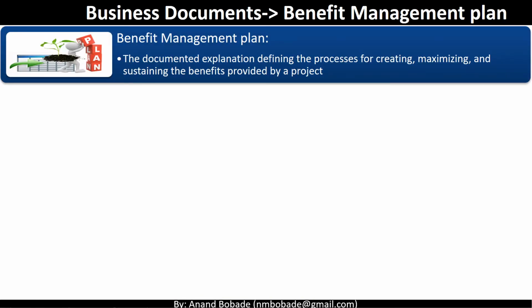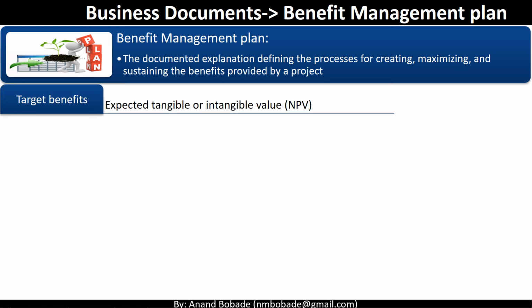Another important business document is the benefit management plan. So what is this? It is the documented explanation defining the processes for creating, maximizing, and sustaining the benefits provided by a project. It will contain a lot of information, like target benefit, which means the expected tangible or intangible value as an outcome of this project.